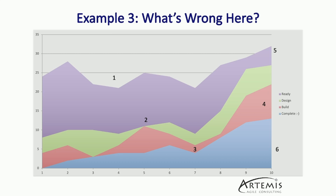For this example, I'd like you to pause the video here and take your own notes on the things you think are wrong with this cumulative flow diagram, then unpause the video and we'll talk about the results together. The first thing is that we're removing work. We've committed to almost 24 points, we've added work, we've removed work, we've added work again, we've removed work — we are seeing a huge change in the amount of work in the team's sprint backlog. That is an anti-pattern we want to recognize. Number two, we have starvation — a starvation of the build state on day three, and a starvation of the design state on day five. We're looking to flow work through the system so that we can complete and deliver it. Stop starting and start finishing, because starting work doesn't have value to our customers — finishing work does.